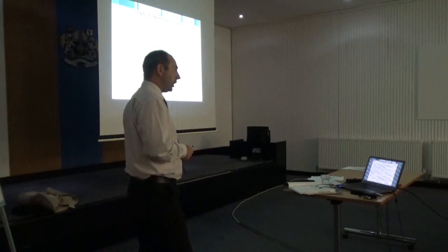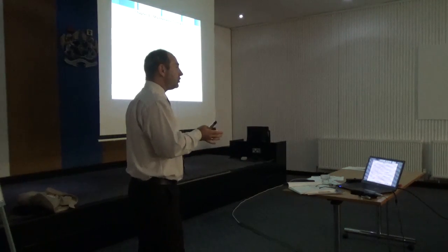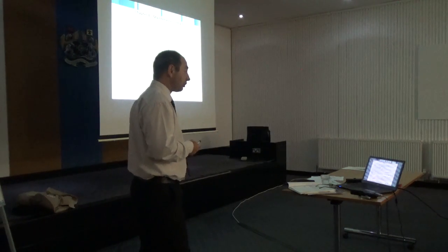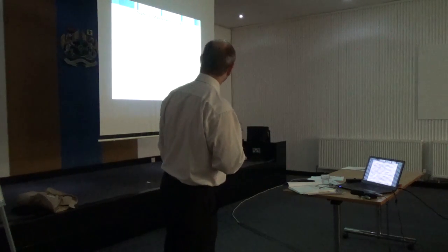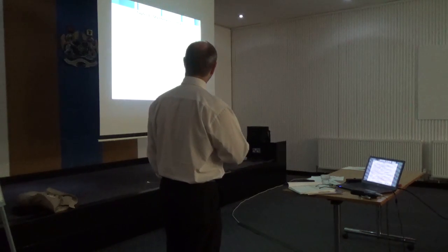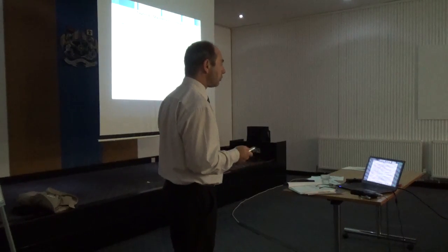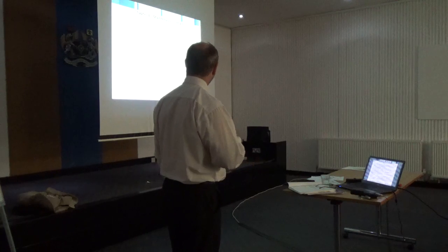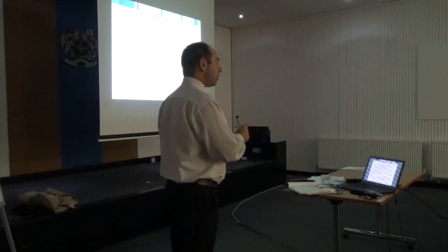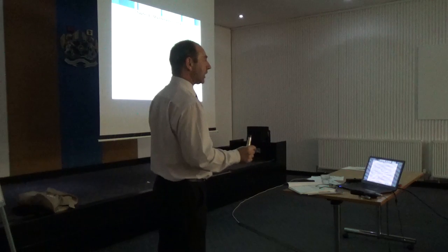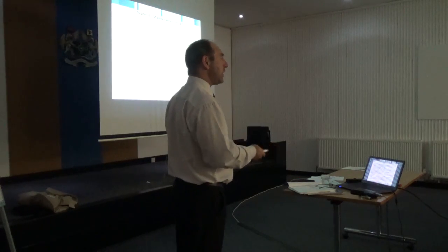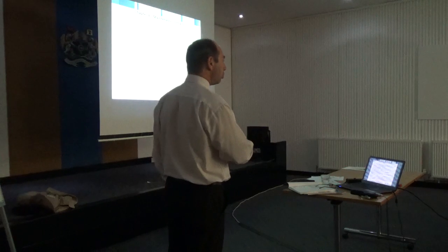Form of contracts and payment mechanisms, it talks about the various different types of purchasing that you can do, and it gives some guidance around documentation. It also talks about the importance of mobilisation and in fact demobilisation and the time that needs to be allowed. Personal view, a lot of contracts fail because they're mobilised very poorly. And that's because so much time seems to be taken up with the process of evaluating cost, and then it's a case of, great, we'd like to contract with you, can you be up and running tomorrow? Again, that's the uninformed client that's actually creating their own problems.